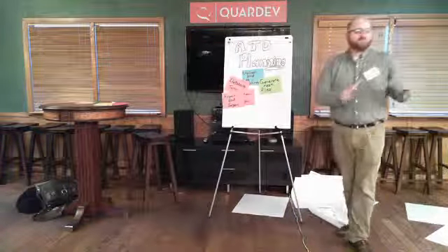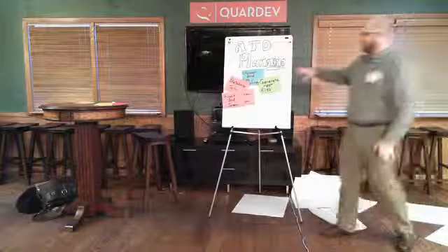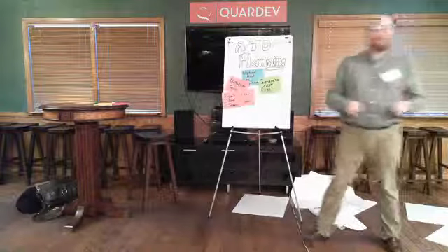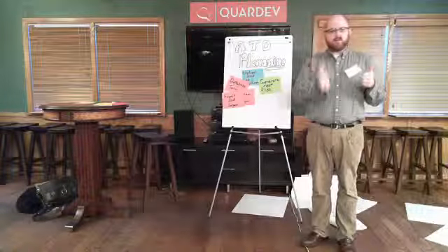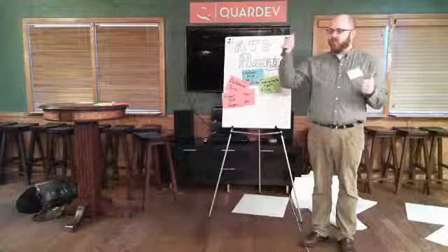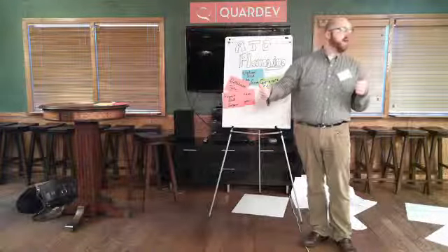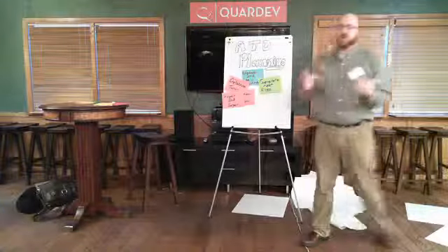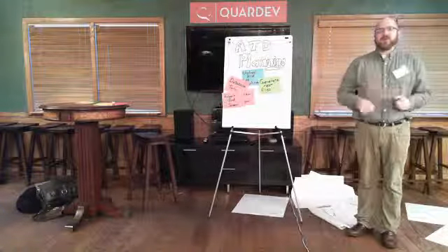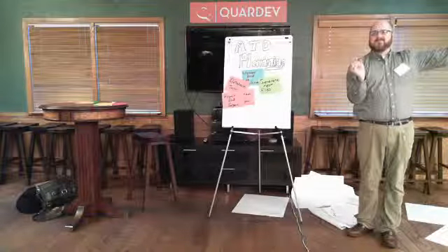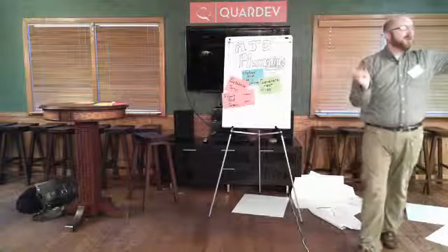Sometimes we'll say, well, I want to do this test. So for upload and confirmation, we'll say, okay, we're gonna do that. And then we're gonna test that it's only these allowed file types, and that's a separate one. And then we're gonna test that the file is only this size or smaller. And the programming teammate is gonna say, you have broken it into pieces that are this big, and this big. So as long as that's clear, we're okay.